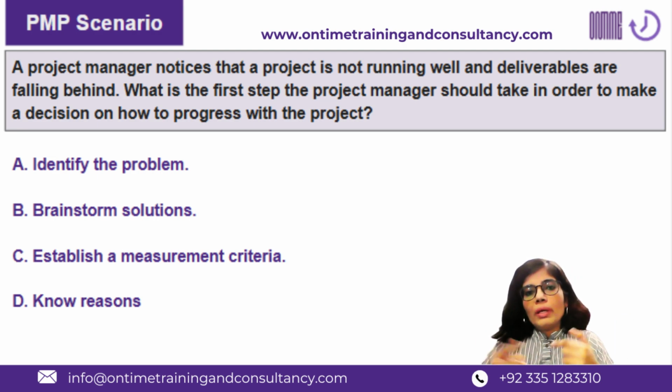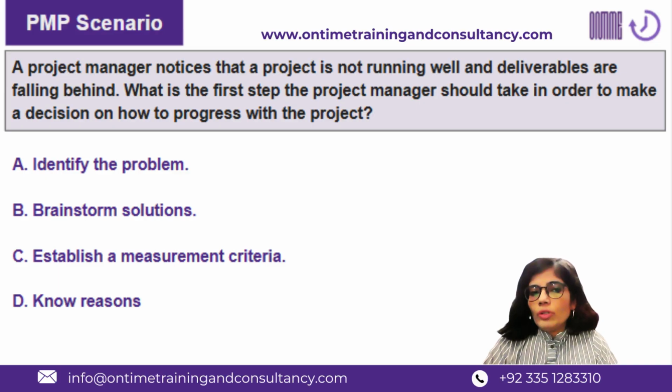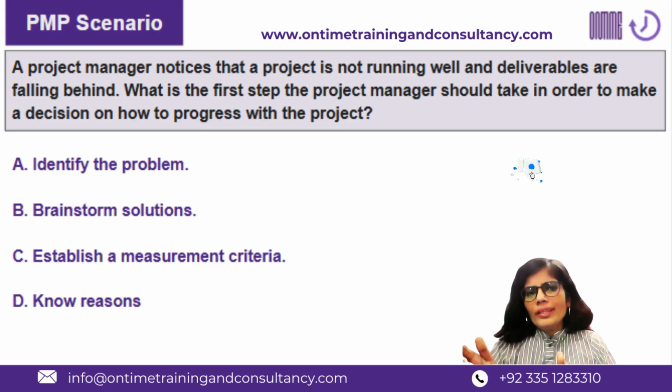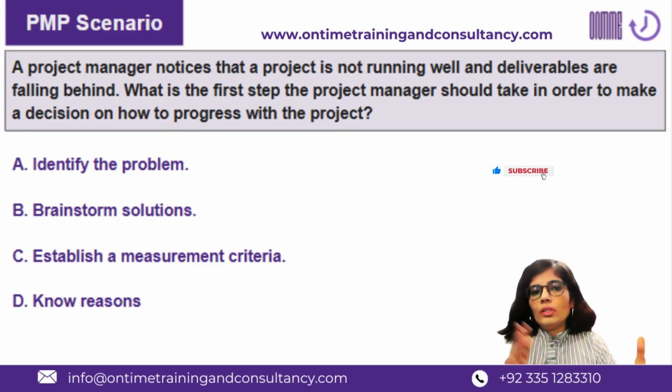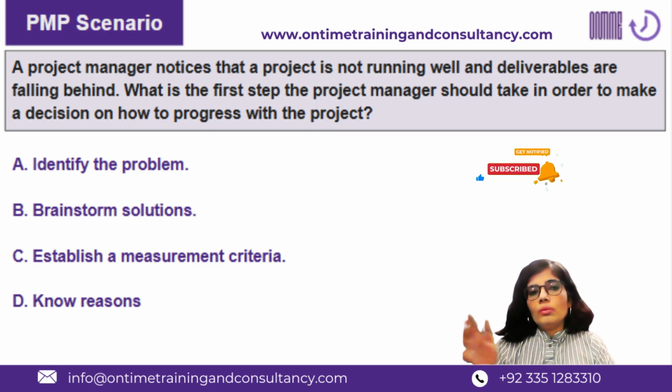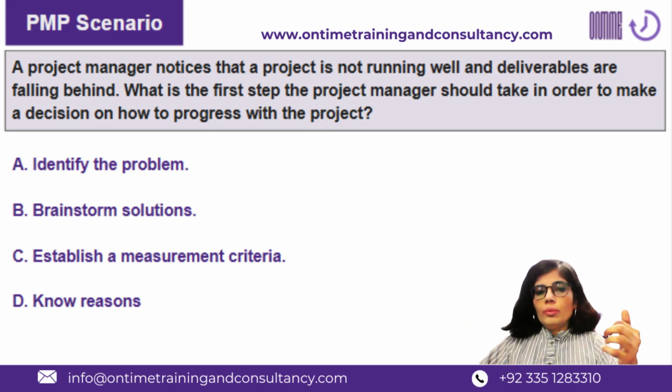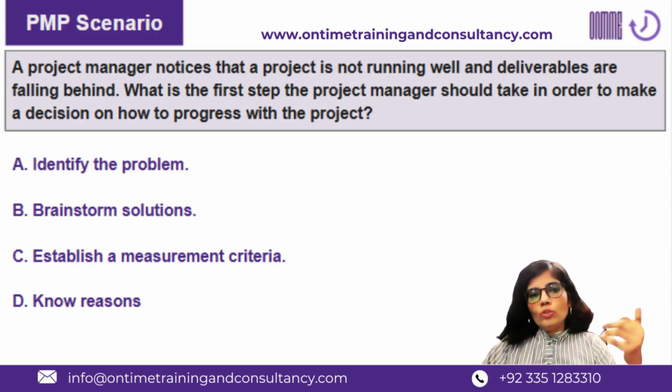So knowing the reason, mapping it or matching it against the available data, tracking sheets and dashboards and different other mechanisms to understand if you are making any false assumption about those reasons, and then get into the root cause, right? Understanding which reason is actually the reason, and doing that in an iterative cycle, maybe using the 5 why analysis mechanism, or maybe you can just apply the cause and effect diagram, whatever works for you.